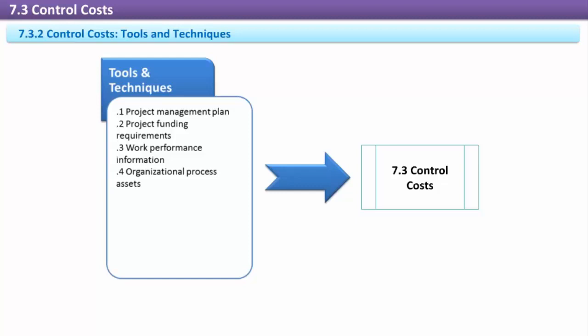To complete performance index, TCPI. TCPI is a formula that provides the level of performance that must be achieved to meet either the budget at completion (BAC) or the estimate at completion (EAC). Performance reviews. Performance reviews are assessments that analyze the project's historical cost performance. It can include earned value measurements, variance analysis, and trend analysis.